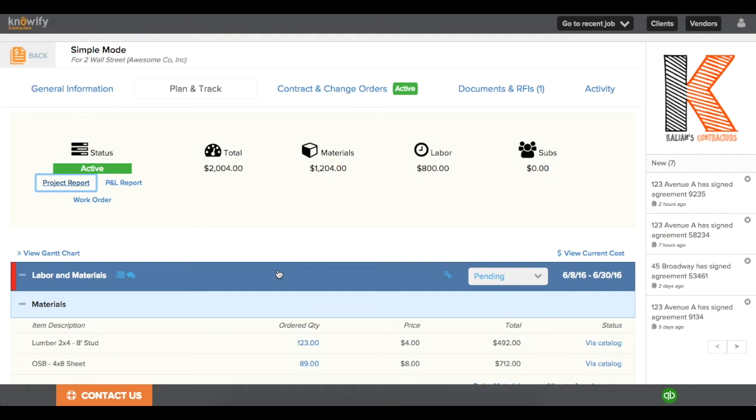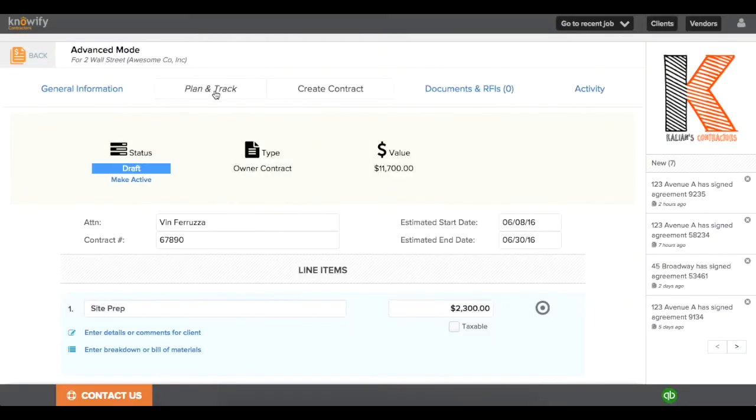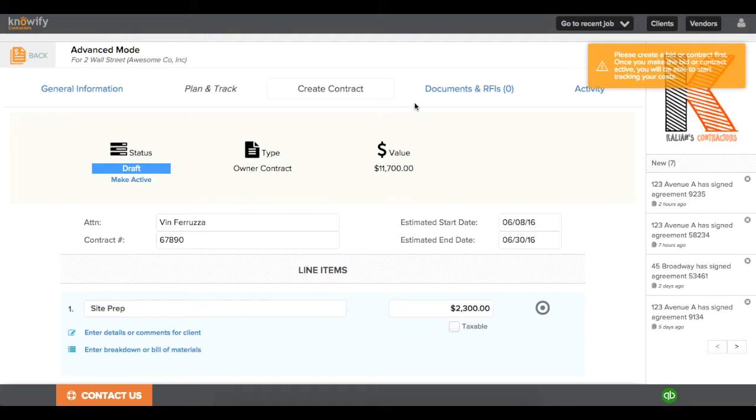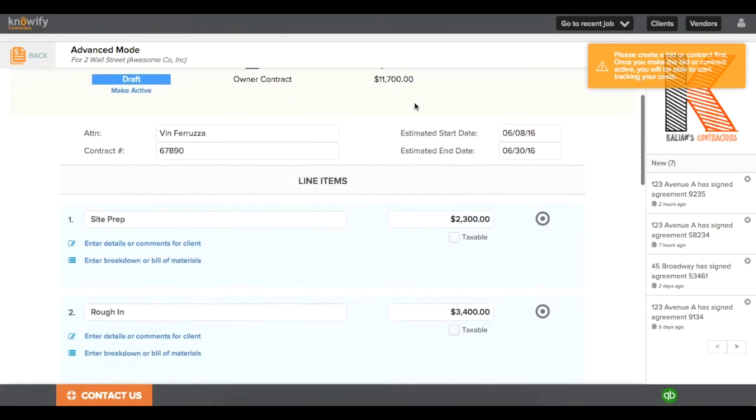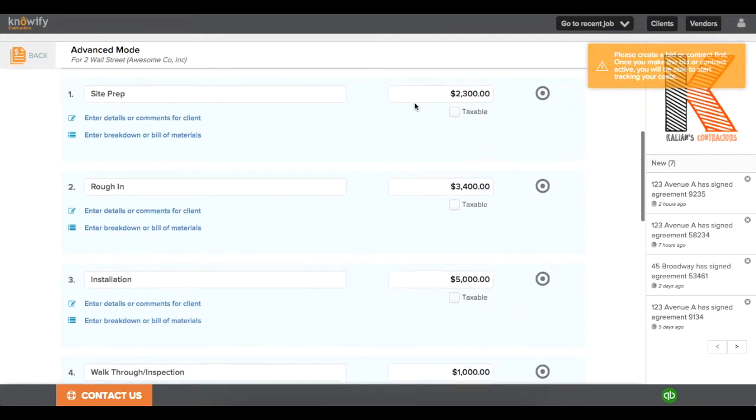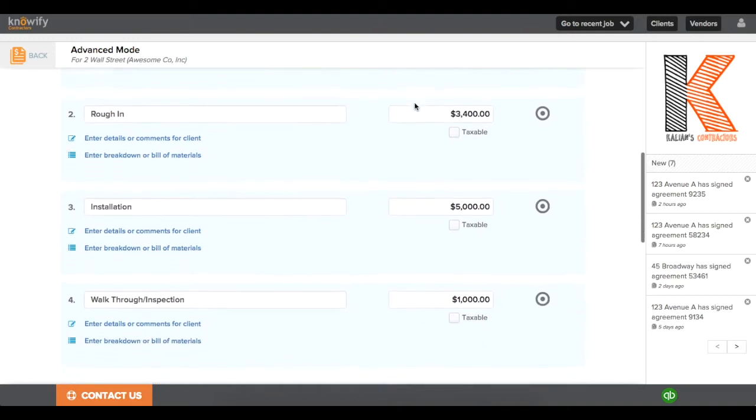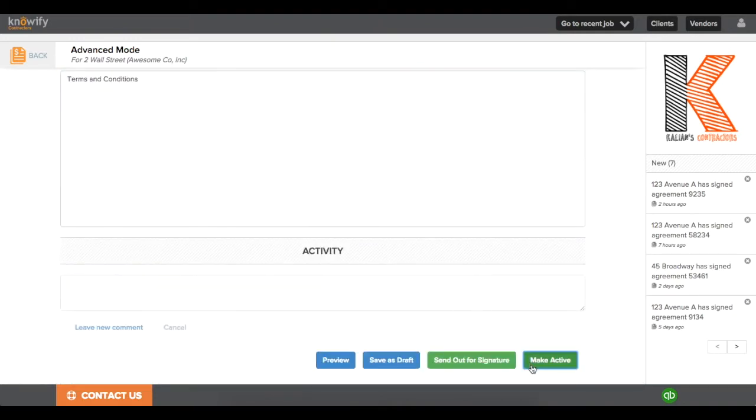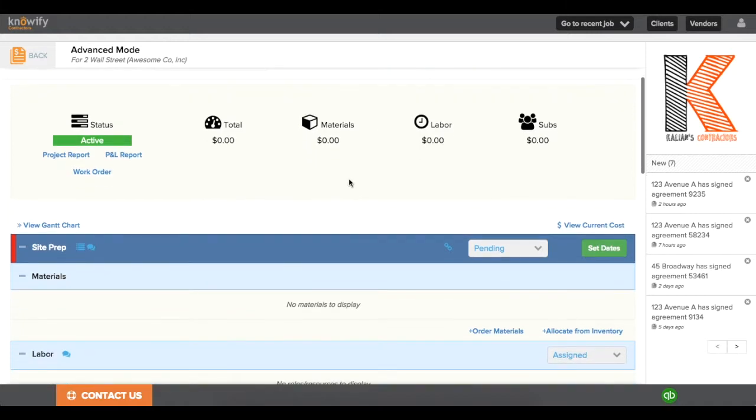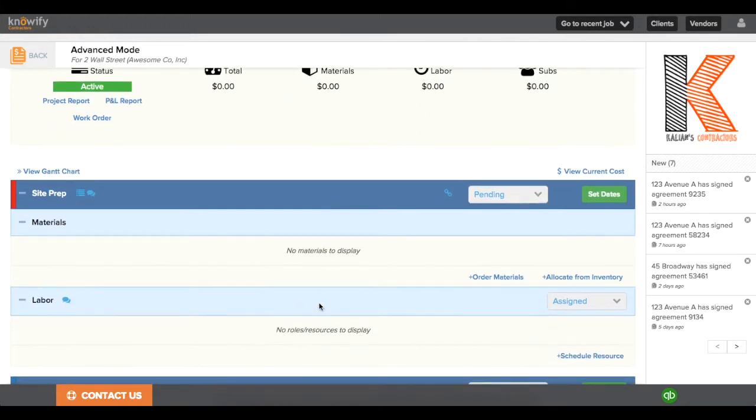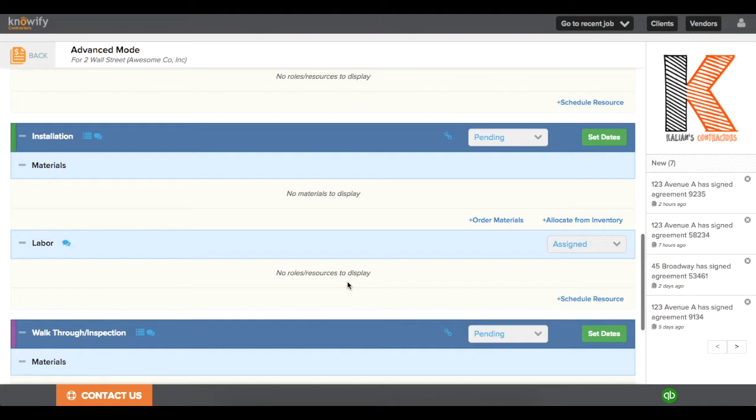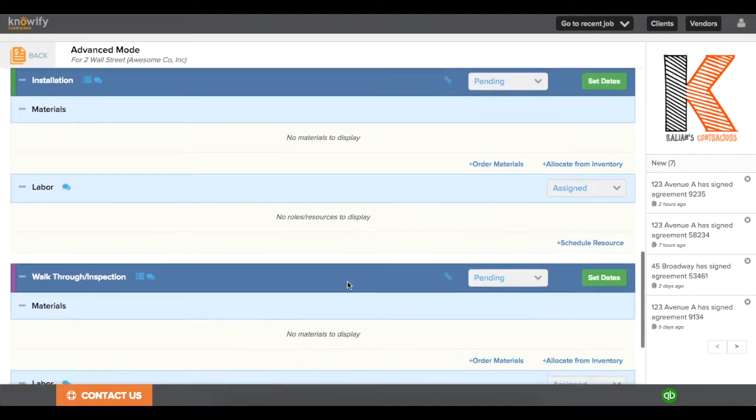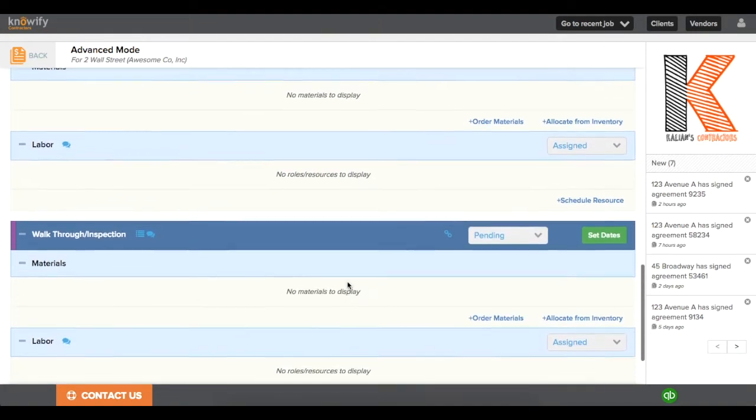Next we'll cover the advanced style of job costing in Knowify. The creation of an advanced job in Knowify is very similar to our simple mode, where we're going to start in our Create Contract and the Plan and Track section is going to be locked. You'll see we have a contract already built in here with several different line items, and when I make this active, the big difference between advanced and simple is that now my project plan and track is going to have a phase for each line item that I created, as opposed to just the one phase called Labor and Materials.